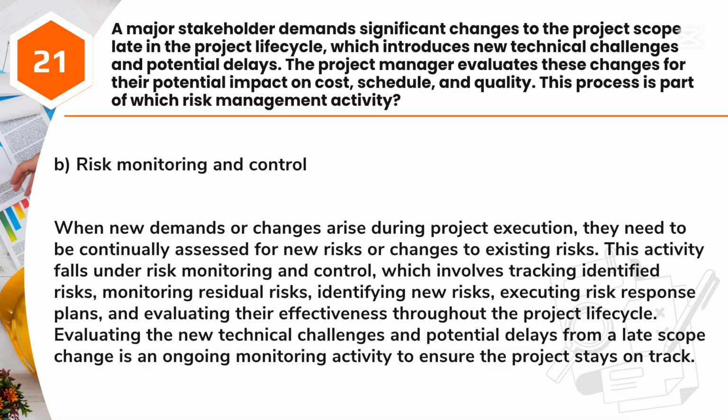Answer: B. Risk monitoring and control. When new demands or changes arise during project execution, they need to be continually assessed for new risks or changes to existing risks. This activity falls under risk monitoring and control, which involves tracking identified risks, monitoring residual risks, identifying new risks, executing risk response plans, and evaluating their effectiveness throughout the project lifecycle. Evaluating the new technical challenges and potential delays from a late scope change is an ongoing monitoring activity to ensure the project stays on track.